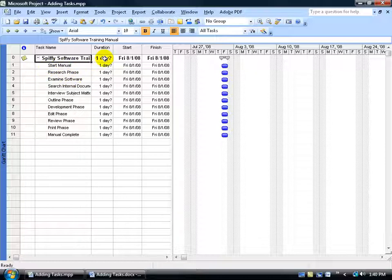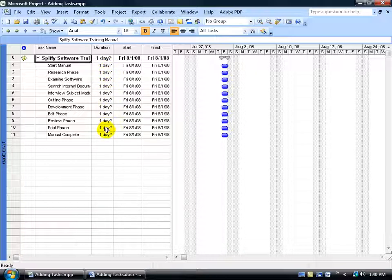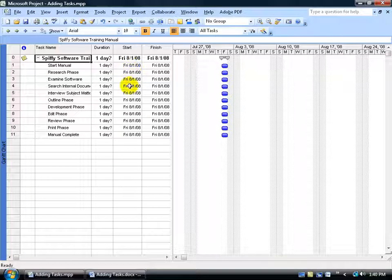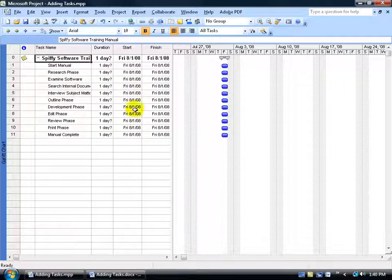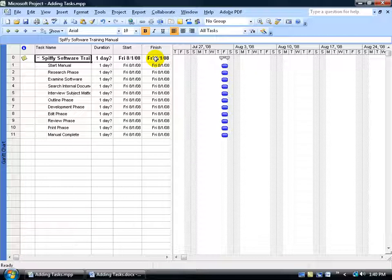Duration is one day. That's a reflection, the project summary, of the duration of the entire project. Now it's not looking at it collectively, counting up 1, 2, 3, 4, all these days here. It just says, look, the first task starts on August the 1st and also the next task. All the tasks start on August the 1st and all of them end on the same day. So it takes the earliest task, the start date, which is August the 1st, and then over here in the finish field it'll take the task, the longest task, and say that that's the project summary finish date.